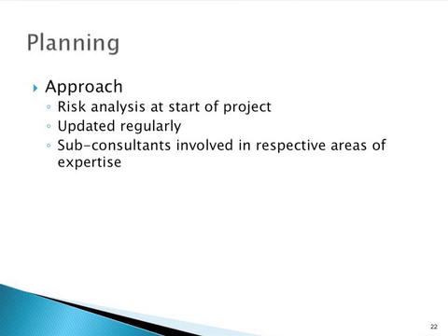The following slide discusses some general components of risk management. Risk analysis will be completed at the start of the project in order to assess both positive and negative risks, as well as procedures to follow should that risk situation arise. This list will be updated regularly, removing risks as they become obsolete and adding new risks as they arise. Sub-consultants will be involved in risk planning in their respective areas of expertise.